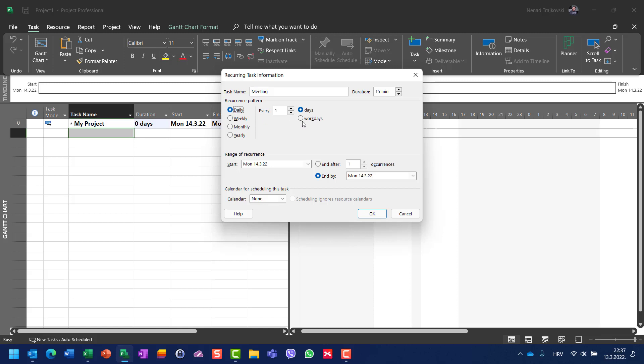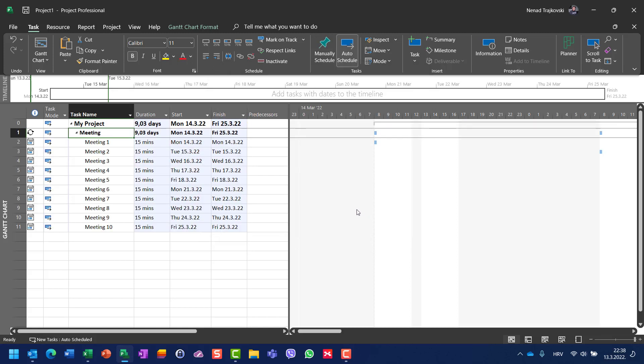I will say that it will have a duration of 15 minutes and I will say daily. After that, I can choose should it be repeated every day or every workday. Obviously, I will have a meeting every workday. Let's say it will start after 10 occurrences, and I will hit OK.